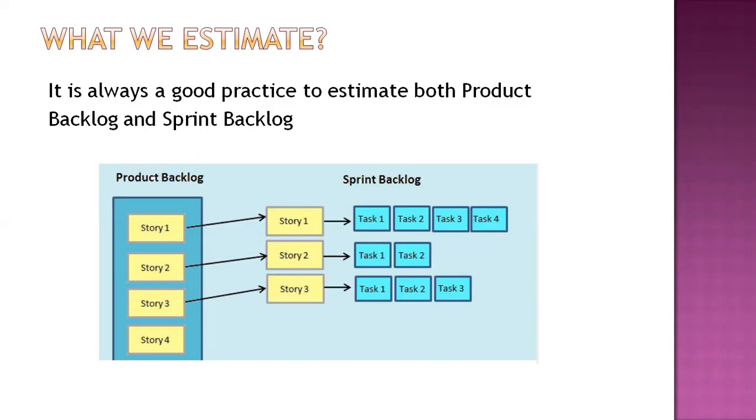So product backlog estimation is very important, but the prerequisite is to please clean up your product backlog very often, so that it will be a very sanitized list which will help you understand, okay, these are the items that we have and these are the items that are required for the project. And if I am clearing up the doubts of these work items and estimating them with the help of the team, then we are able to foresee and forecast the project timeline.